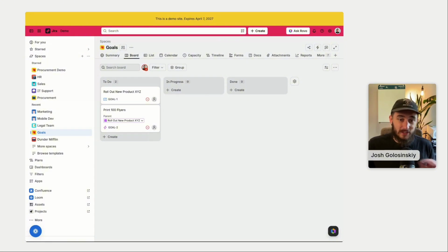But linking the goals that we looked at in the directory makes it super, super easy for us to actually bring that into Jira. And linking work items is a little bit heavier and more dense because we have to assign a type of link. Like, is it a blocker? Is it a linked issue, a relevant thing? You have to assign those versus just going in and assigning a goal onto the Jira task. So that's kind of why I like the goals. And I'll show you how that works in just a moment. But this is the second option.